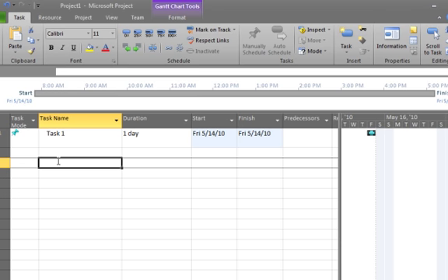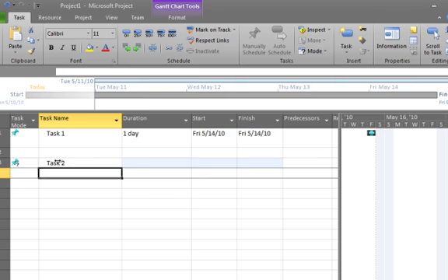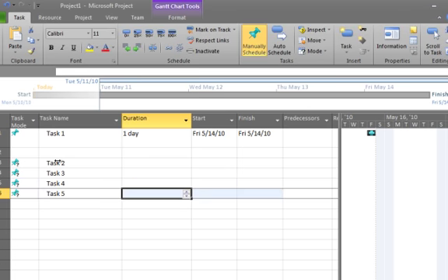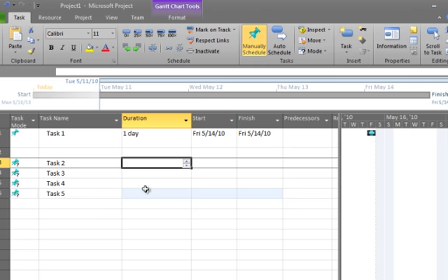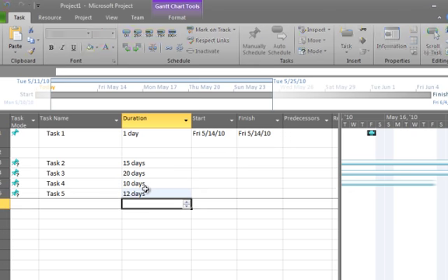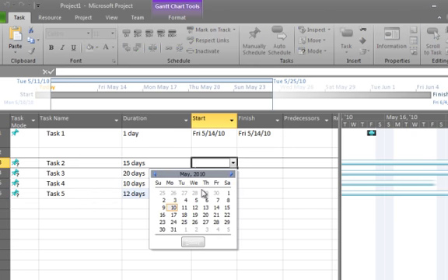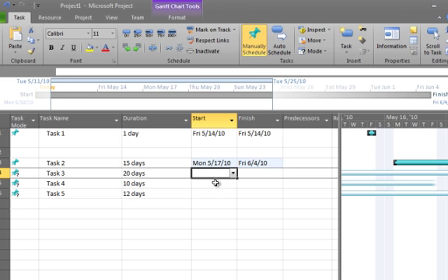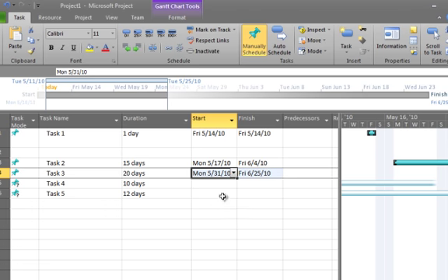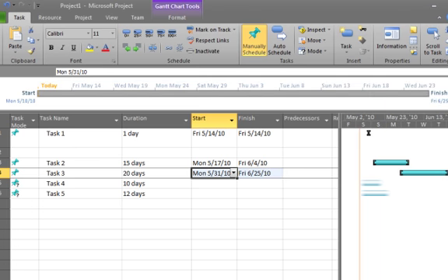Another reason for why I might want to use this feature is imagine a small 1 to 3 month project where you just maybe have a small set of tasks and you just want to be able to track this small grouping of tasks, and you know that things are going to take 15 days, 20 days, 10 days, etc., and you just want to go ahead and plug in the dates. If we don't hit them exactly, if we're not quite sure if we're going to make those dates, not a big deal. We can work around it, but we don't necessarily want to have to create a critical path.